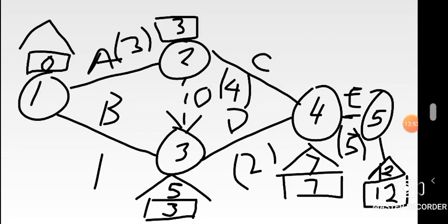So the latest completion time was 7, leading to 2. In the route there's a 4. So 7 minus 4 gives us what? 3. Okay, that's a possible figure. Let's look at the other route going to 2. We have a 5. We're on 5 as of 3, as the latest completion time. We're going to 2 now. From 3 to 2, in the route there's 0. It's a dummy route we're even using. So it's like 5 minus 0, 5.